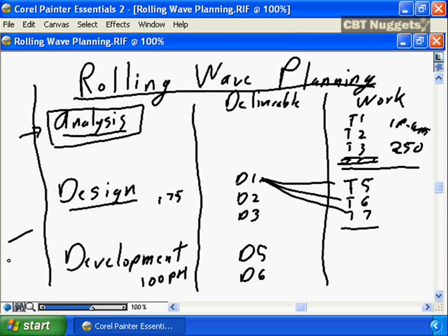But you need to ensure when presenting that total project effort, that 525 number, that you're presenting it in a way that people understand that there's a degree of imprecision, a degree of flexibility. When you're presenting the information, you're defining that it's plus or minus a certain percentage, plus or minus 75%. When you're doing rolling wave, it's important that you present that the total project size has been estimated, and you have a certain degree of confidence, potentially not high, because we're simply doing a very high-level cast of what our further out phases are going to be.